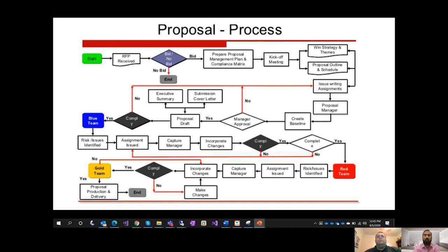For each of those requirements there are responses that you need to write. The system gives you the ability to assign the timeline for when that task or requirement response should be done, who is going to work on it, and how many hours this resource will take. All of that planning you do after, or even before, working on a proposal.